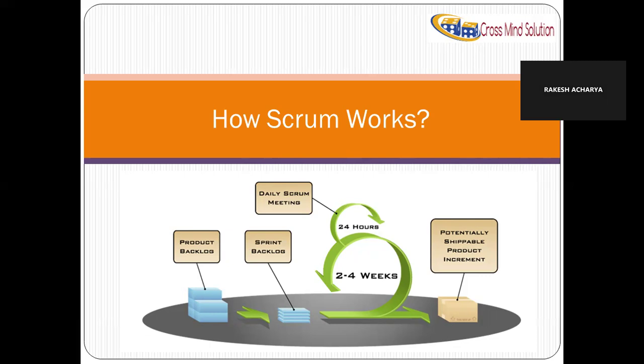So there are a few things we are discussing: how much work we can complete in one sprint. This depends on the capacity of your team members. In the office we say we are working 8 hours in a day, right? In Agile, we say 8 hours is not only for development. We remove 2 hours for lunch and meetings, so your team members will work 6 hours per day, correct? Correct. So if I have 10 working days, one person will deliver 60 hours of work, correct? Right.